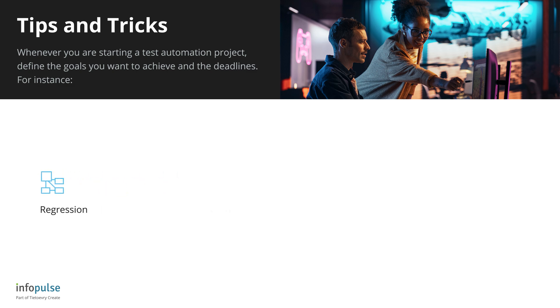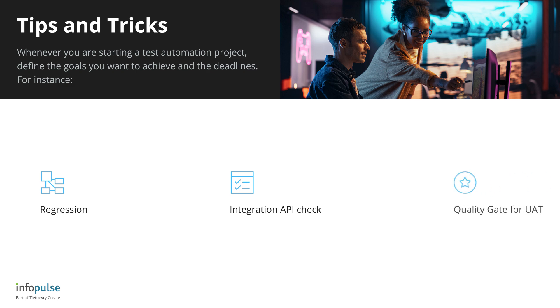We need automated API tests for the dev team to be executed on each build to let them know their changes did not break a thing, expecting integration to CI in two sprints. We need an automatic quality gate before releasing to UAT - a few dozens of E2E tests. We'll check the progress in a month. Goals will help you to focus on specific test cases to be developed first.